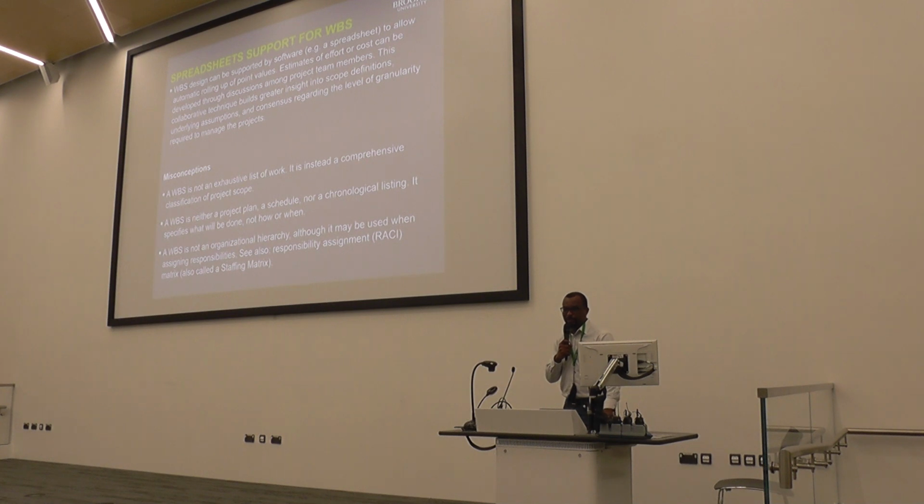Does it work in line with the method statement? Yeah, kind of similar to the method statement, but the method statement is more detailed. Yeah, this is just outlining the timeline of your activity. Yeah, the method statement is more detailed because it actually describes how you're going to do the work. Yeah, correct. And then the sort of resources you need for the work, which is a lot more detailed. But with the work breakdown, you want to have a much broader overview of what you want to do.